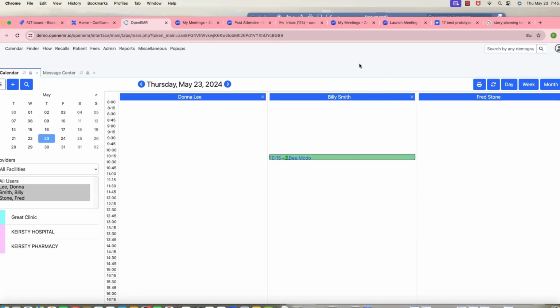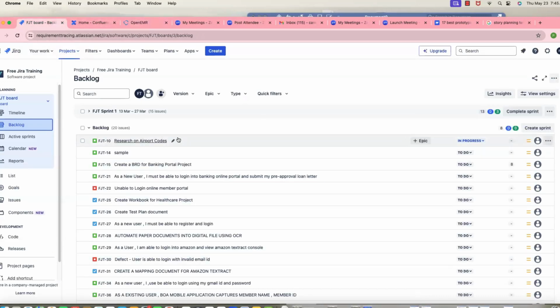But the developer can choose, his points will be different, right? For you, you are creating the BRD, the mapping document, the protocol. For you, this can be an 8 pointer, but for the developer, this can be a 5 pointer. So from your points, you're reducing the work. If, for example, there is one login user story, for you it is a 1 pointer, because what you're going to do is test. But to create that for him, it can be an 8 pointer. So you can take the same user story, and for you this can be a 1 pointer.